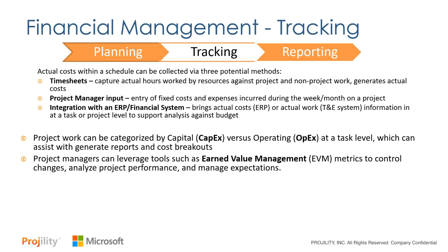Hey, we're 20% of the way through the project. Problem is we've spent 30% of the money and only 15% of the work has been done. And then that can forecast out using earned value when you're going to finish and how much work and time and dollars it's going to take to finish.